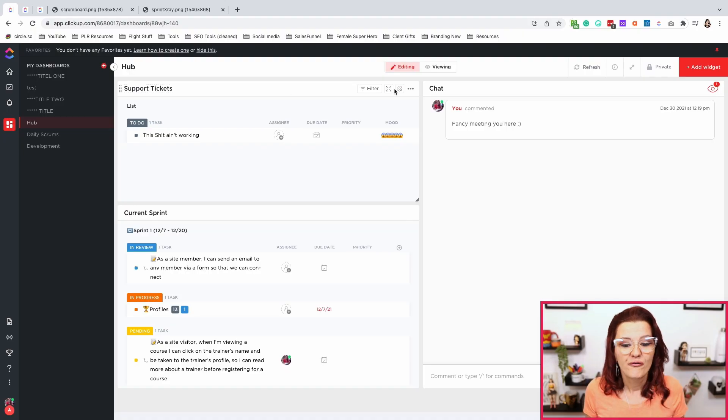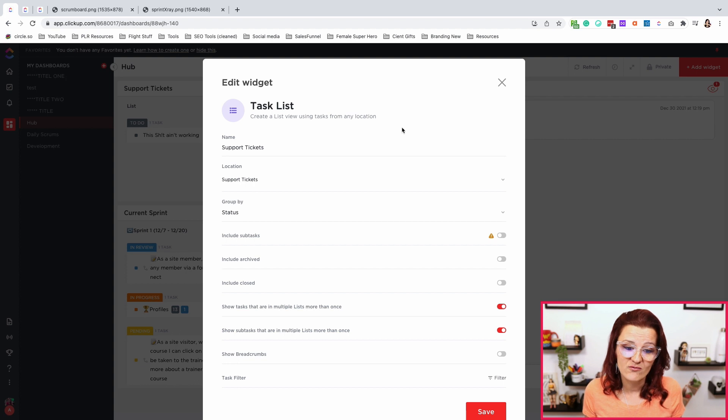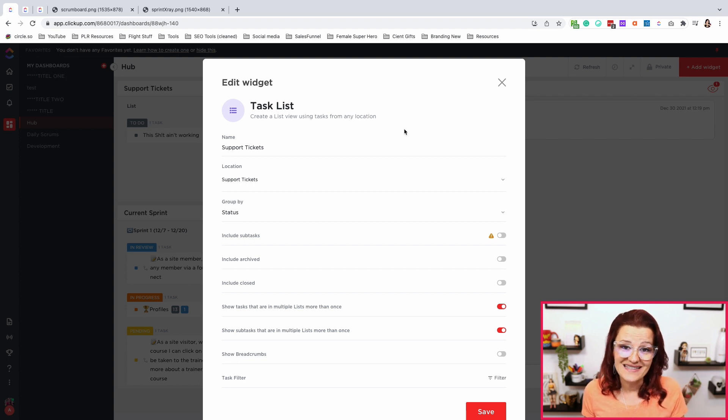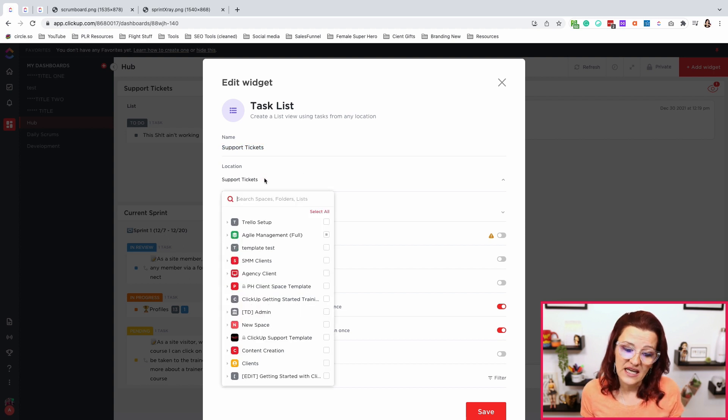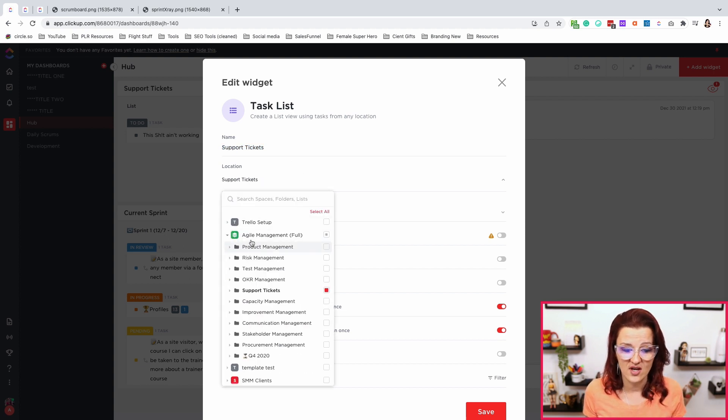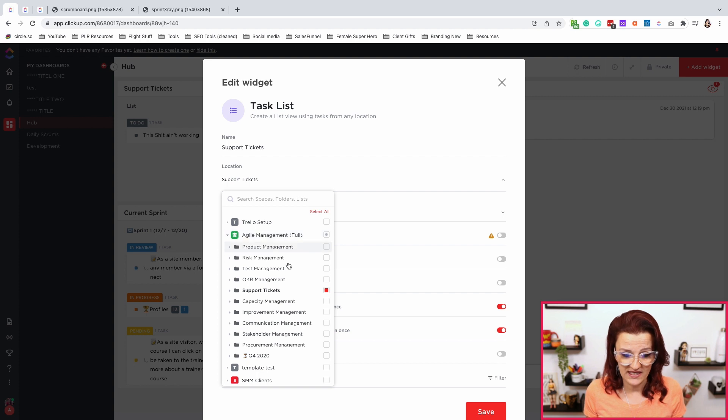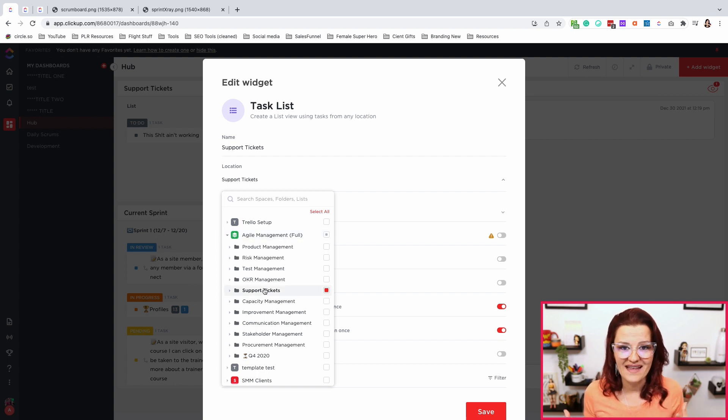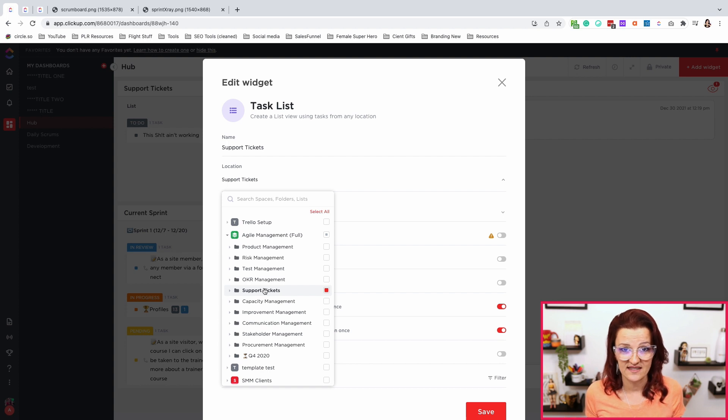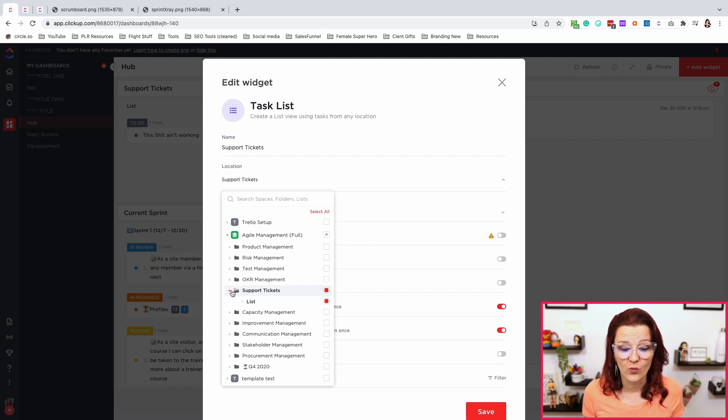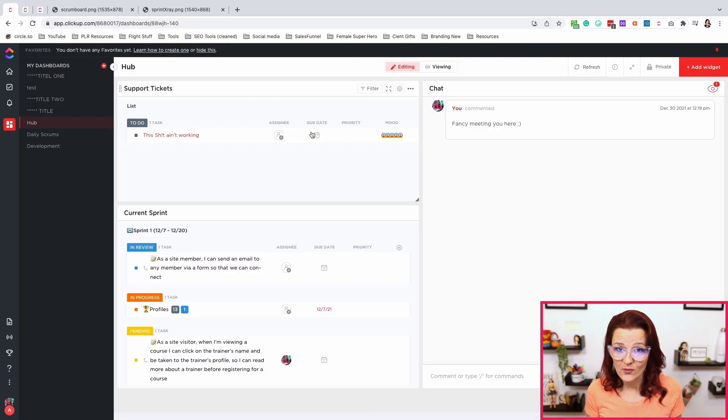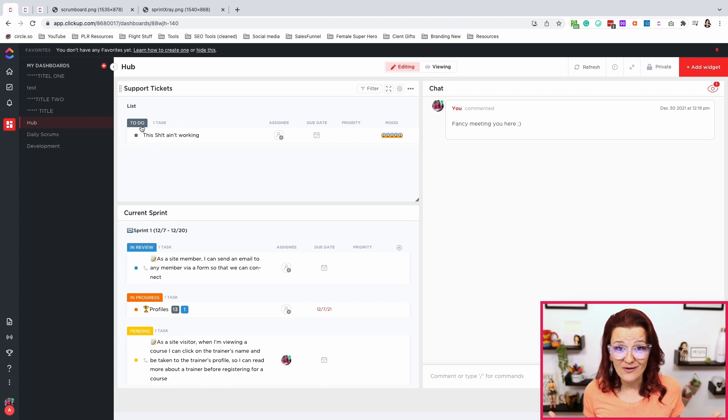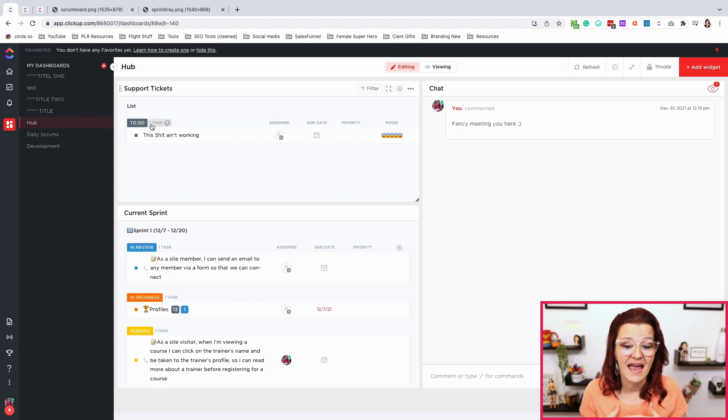Now for support tickets, what we did right here is a task widget that we then call support tickets, and we are pulling in from our location. So our agile management space, we have a folder called support tickets. That's where everything is going to be collected. And that's the task that we are funneling in right here. Again, there is no major different setup and filtering or anything going on. We literally just pull in the task widget, choose our list for support tickets, then sort by status and done. That's it.